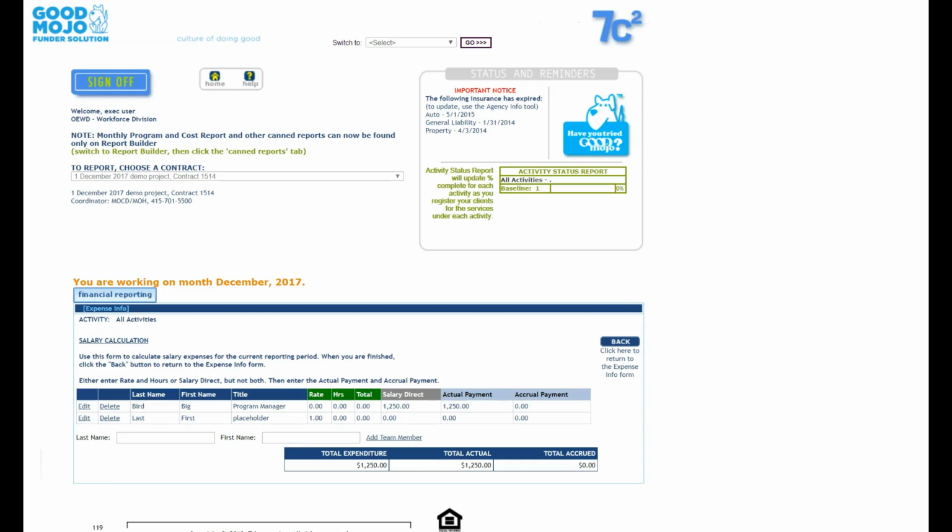Please note that if you're a contractor or consultant reporting your hours, the rates that you're requesting here must match the rates approved in your grant or contract budget. For example, if your executed contract shows an approved hourly rate of $200 an hour for your firm's principal, requesting $250 per hour here in TGS without first calling your grant coordinator to discuss if a budget modification is appropriate and available will likely result in your invoice being rejected back to you to adjust and resubmit.